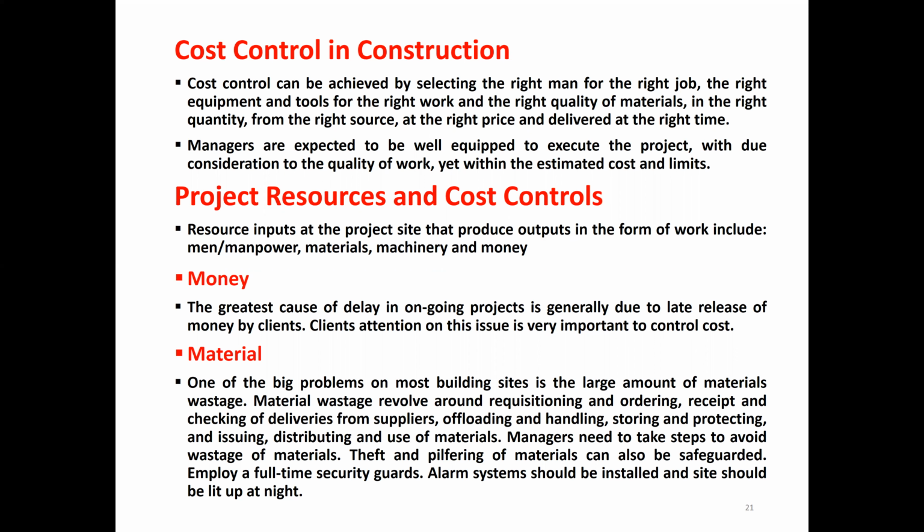Money is the greatest cause of delay in an ongoing project, generally due to late release of money by the client. If the clients delay the payment, the monthly progress payments, that will create a lot of problems and will delay the project. Client attention on this issue is very important to control the cost. Meaning the client should pay the contractor on time, monthly, without any delay.